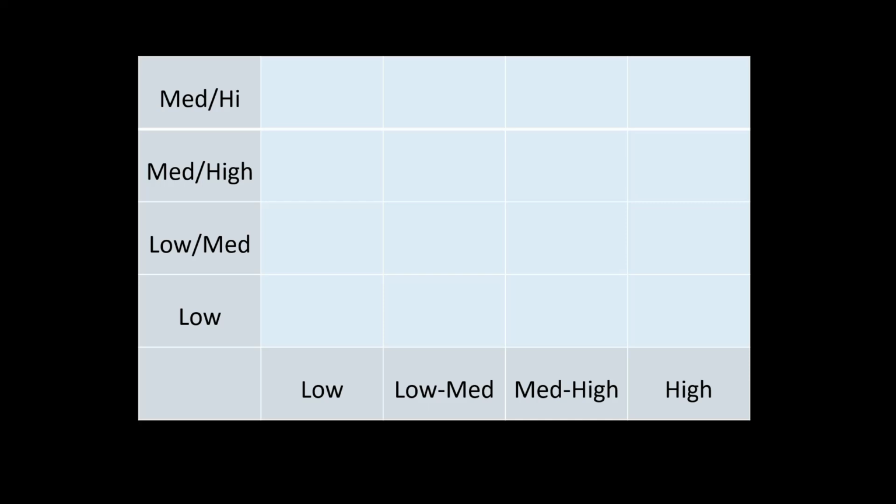So what we do, along the bottom, we are going to judge each of our stakeholders by how interested they are in the project. Do they really care what we're doing, how we're doing it, whether the project works or not? And up the side, we're going to look at that influence, also known as power. So what power do they have to make changes to our project, to stop our project completely, or to force us to make changes along the way?